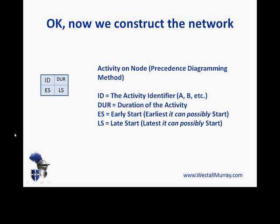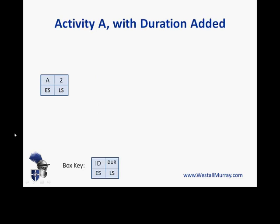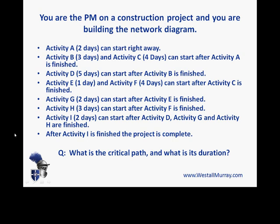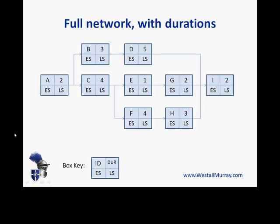Early start and late start boxes are also shown, but for this first part video, we won't be using those two boxes. For Activity A, you may recall it was a two-day duration — Activity A, two days, straight out of the question. The question for Activity B and C said those activities can start after Activity A is finished. Activity D can start after Activity B is finished, and so on. Simply by reading the question and working left to right, we can put in all of those activities as boxes with their durations in relation to other activities. There's our full network — pretty straightforward to construct.